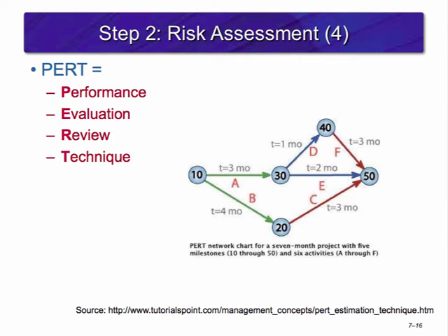PERT and PERT simulation can be used to review activity and project risk. It assumes a statistical distribution range between optimistic and pessimistic. The focus here is more on the macro and less on individual activities. It provides a list of potential critical paths and respective probabilities of occurring.